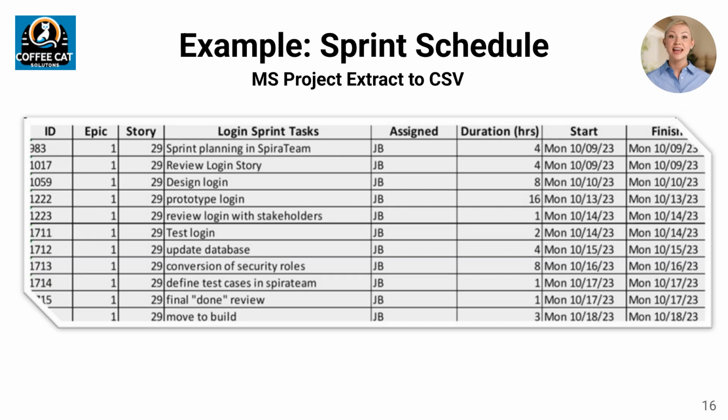This image is an extract from an MS Project sprint schedule. In this example, the story is decomposed to the task level. There are hidden risks with an out-of-the-box Jira or ADO schedule in that these products do not use Agile structures that decompose sprints to the task level with task start and end dates. There is a setup customization you need to do for these products.